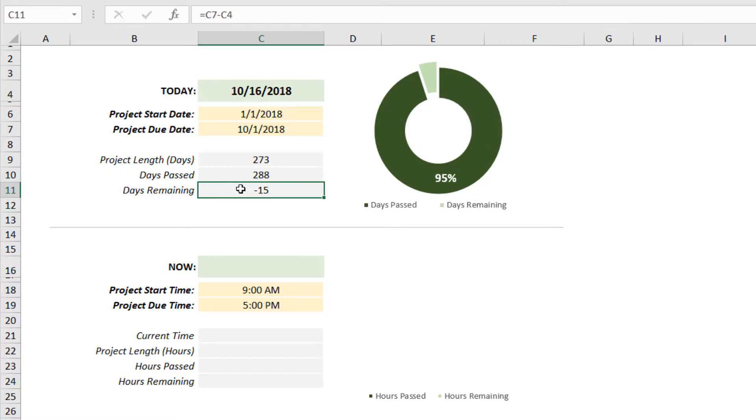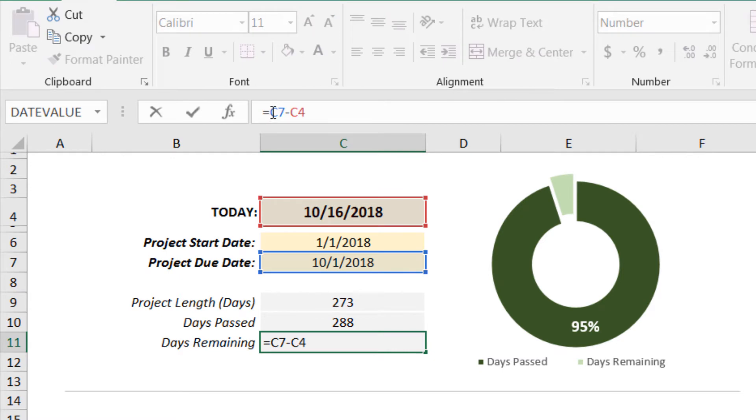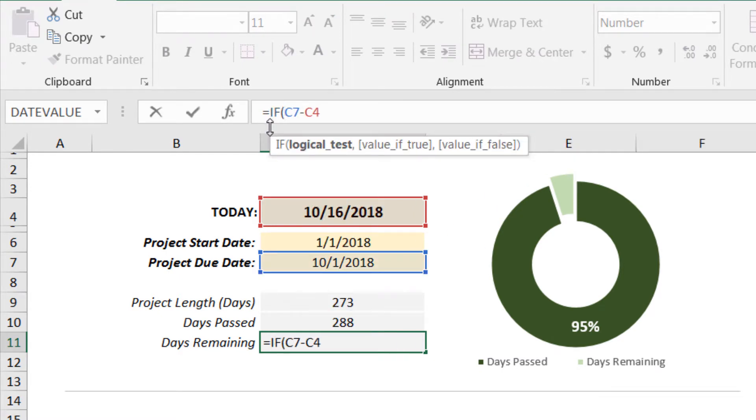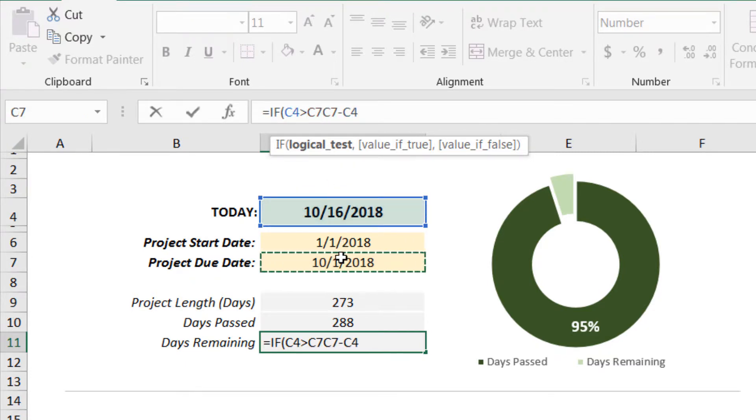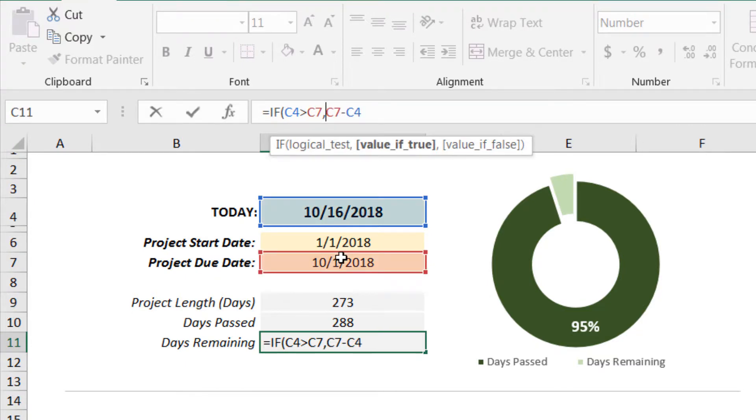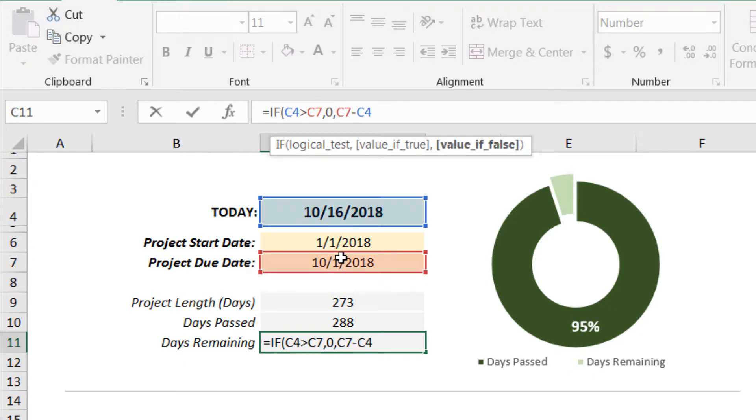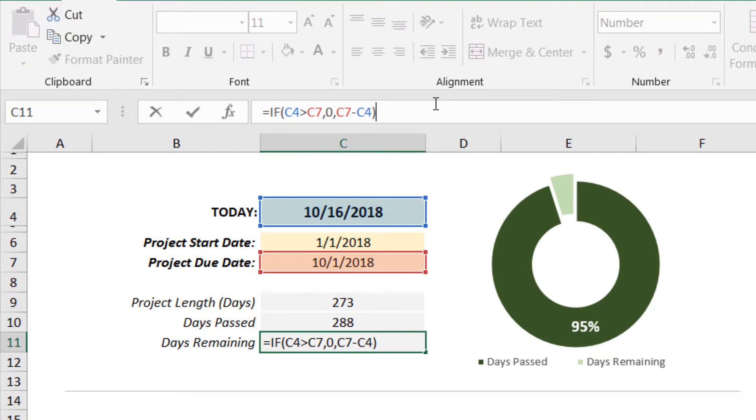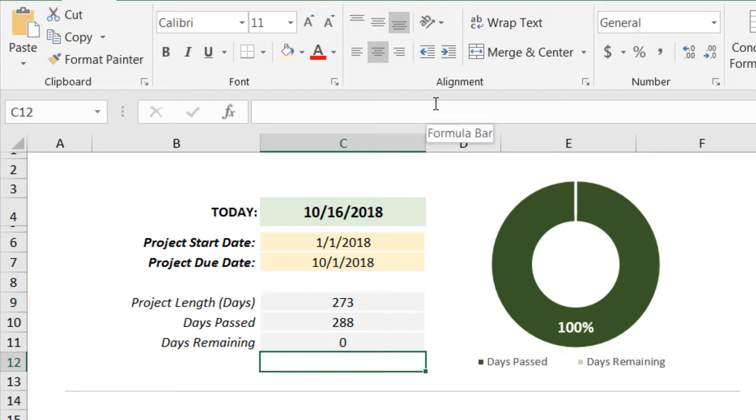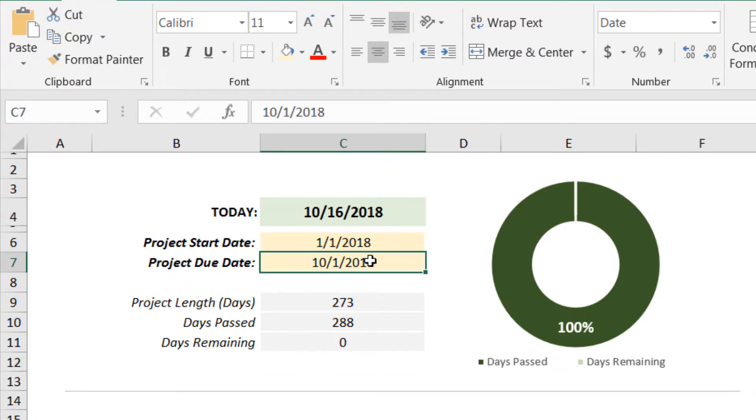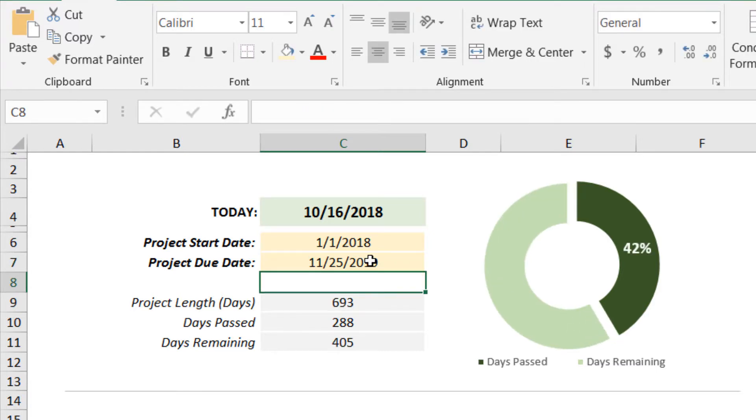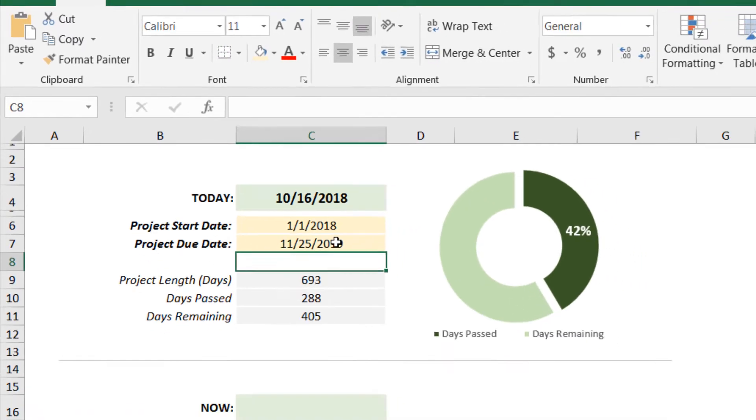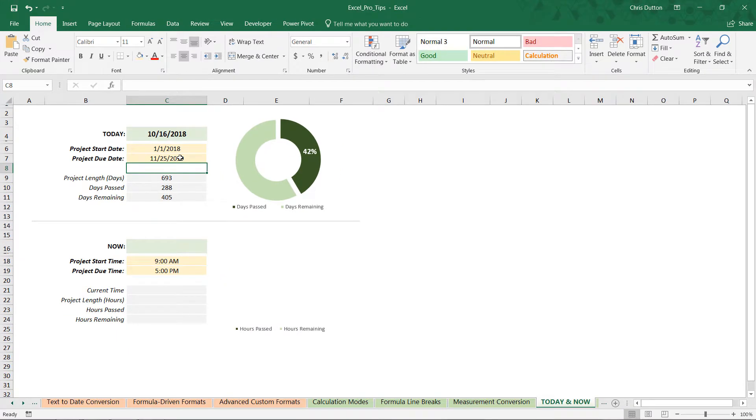To prevent that, let's modify our formula in cell C11. I'm going to place the cursor right after the equal sign and add an IF statement to say if today's date is greater than the due date, if the due date has already passed, then we're just going to enter a zero because there are no days remaining. Otherwise, we're going to run our formula C7 minus C4. Close out that parenthesis, press Enter, and now our graph caps at 100%. We can add whatever date you want in the future—I'll do 11/25/2019. In that case, we're 42% of the way through that project.